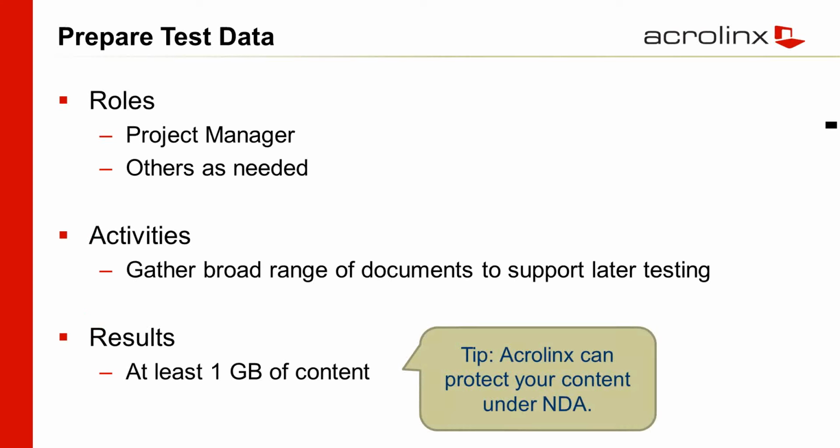Okay, so now we're into the project. The first step, the contract's been signed. Now we're into implementation, and the first step is we need to have some data. Our professional services team needs to have around 1 gigabyte of content, that is text.